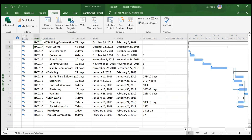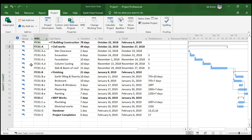After clicking OK, you can see the changes. ITC is the prefix everywhere. The first level shows 01 throughout since we only have one main level (IT building construction). Then there is a dash separator, followed by uppercase letters A, B, C, D, E for the five WBS items under IT building construction. Under A, there is a dot separator followed by lowercase a, b, c, d; similarly for B, and for C there is dot a and dot b. D and E have no further sub-levels.